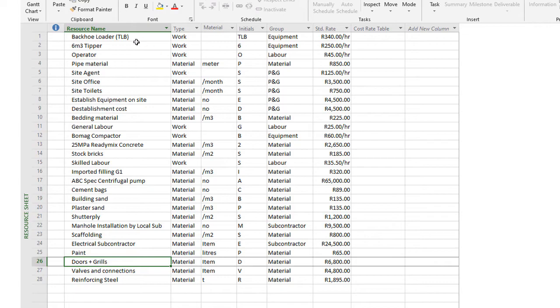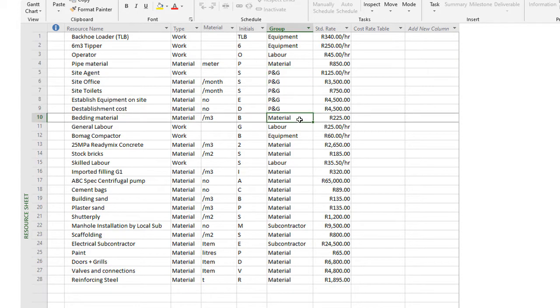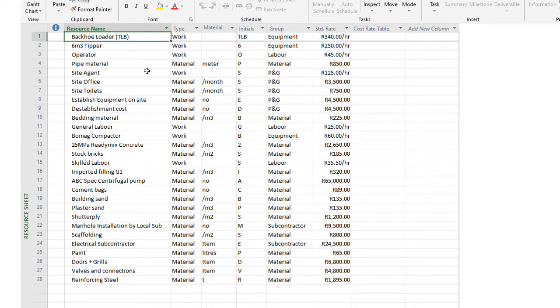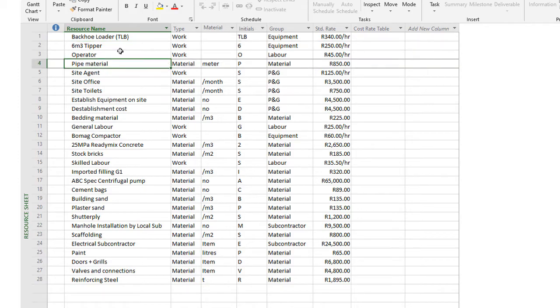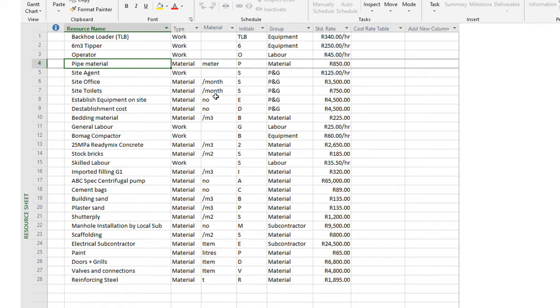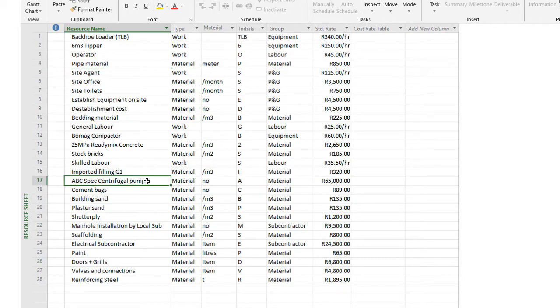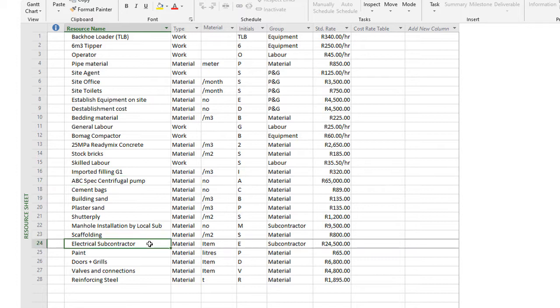You'll see I've brought in equipment type resources, overhead type which we call PNG, material type resources, and even a few subcontractors just for the sake of the exercise. In equipment, I've got a TLB or backhoe loader costing about 340 rands per hour. Then I've got pipe material, a material rate per meter costing 850 rand per meter. I've got overhead items that run per month. Labor items like general labor, skilled labor. I've got detailed cement, sand, shutter ply. A pump that I need to install and subcontractor rates. So that's the cost of the subcontractor to install the complete electrical installation on the project.